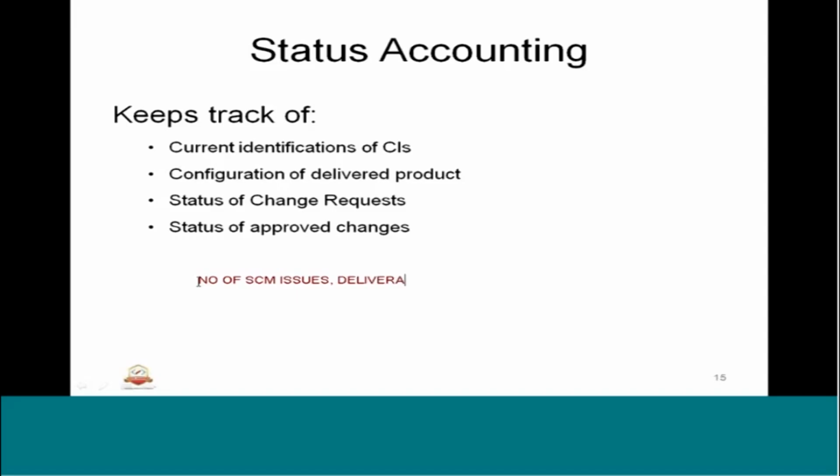What are the deliverables? Whether the right deliverables were delivered, accepted or rejected by the customer, all this will be reported, along with effort spent on SCM activities by the CC, and effort spent by the team, not on development or testing, but on SCM, like check in, check out, all the regular activities in terms of configuration control.